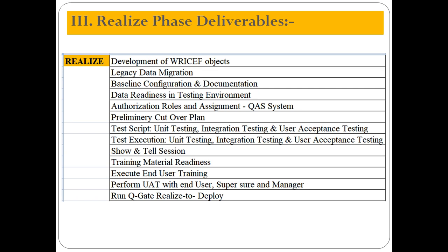They provide the server to you and you have to do the configurations. Once the baseline configuration is completed, then you have to prepare the configuration document. What is the configuration document? This is the client deliverable document. Once you have completed the configurations, you need to prepare the step-by-step configuration document, then you need to deliver this to the client. Then we have to make sure of your data readiness in your testing environment.